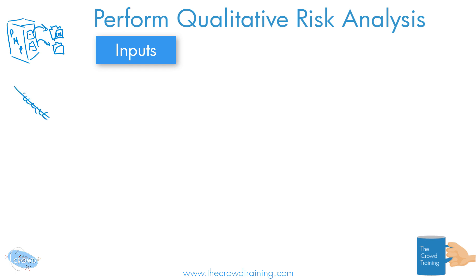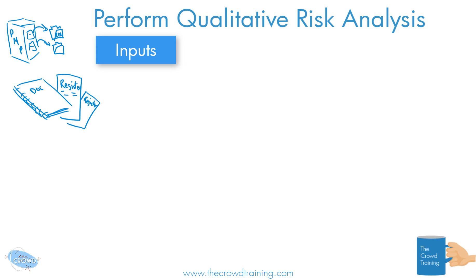You're also going to use a variety of project documents, but really for the most part that is going to be your risk register, because the risk register has the identified risks on it, maybe some categorization, maybe even a listing of who is the owner or who discovered it, who raised it. You can also have the stakeholder register, assumption log, and some other documents — all useful in helping us analyze the risks.